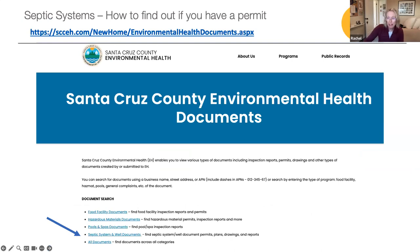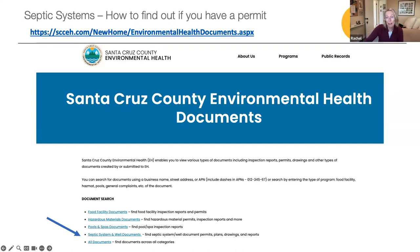Environmental health documents are your starting point to know what the permit status is of your current system, and you can also find out if you have had an evaluation done. You can start by going to the environmental health website and looking up your property to see if your system has a permit — you will need the assessor's parcel number, the APN, to search. That can also be found on the GIS mapping system under the parcel information tab that we showed you earlier.